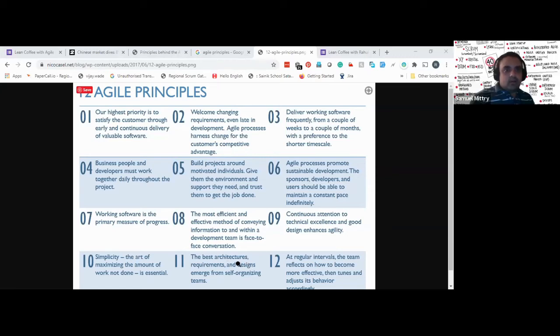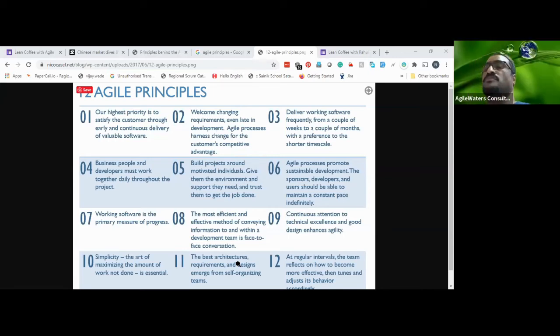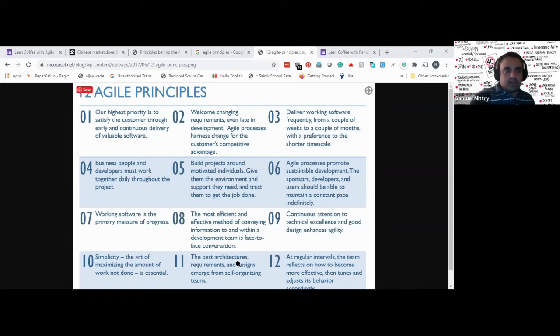I agree. Yeah. And also the role of a Scrum Master or coach working with the team. For example, I will tell a scenario I did here. For one sprint, I told the developer you will be the tester, and the tester you will be the developer. In these cases, I minimize the sprint backlog, to about 60%. Why? Because I need to make a T-shape in my teams. I need this to succeed because sometimes there is no developer available, or no tester available. If you do this exercise, you will build the full stack developer or full stack engineer.